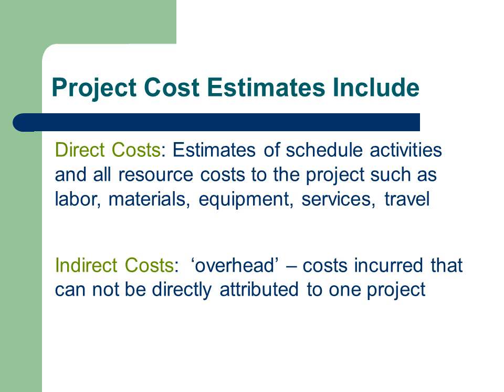When creating your cost estimate, you must also consider indirect costs. These are costs which are not specifically incurred by your project, but must be included in order to pay for the cost of running your organization's business. Examples of indirect costs are management overhead, shared services such as the HR and accounting departments, or the cost of occupying floor space and using electricity, etc.